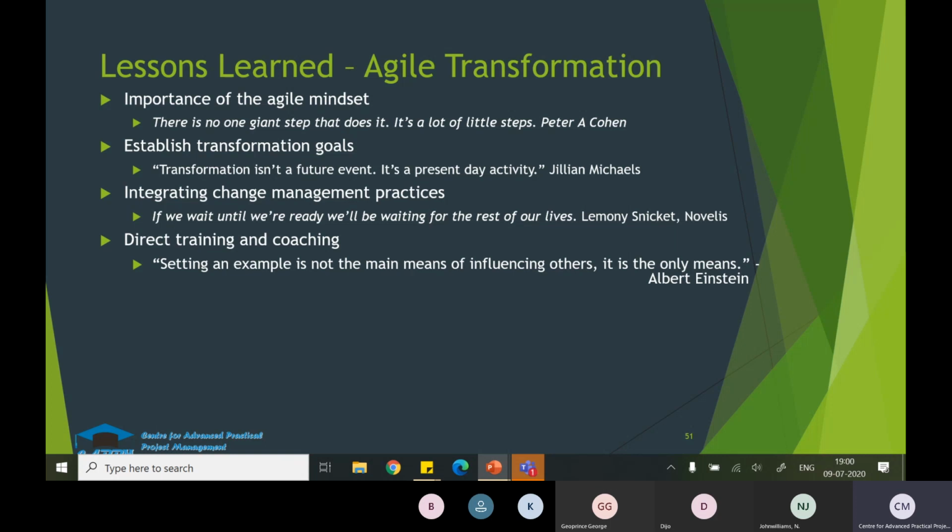And providing direct training and coaching to the leaders and managers so they know what their role is and how to behave with self-managed teams. And delivering agile team training just in time before the first sprint. Identify high profile projects or organizations, and hire or source a coach who will be able to drive the achievement of the transformation goals, guide the team on the agile journey, encourage agile behaviors, and create a positive, we-believe culture.